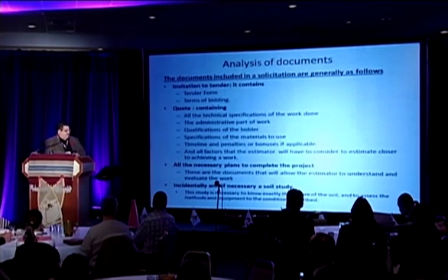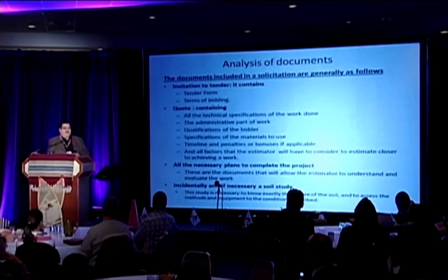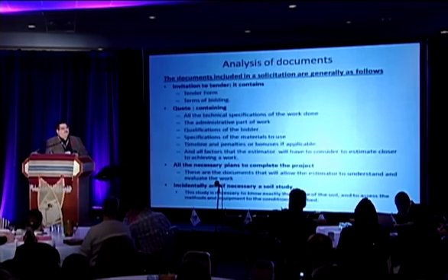Also included in the bid documents, and this is always a concern in the north, it will be the necessity of having a soil study, which is usually provided by some engineering firms that went to do some soil tests for the client. A very important part for any bidder to look at, because if you're bidding and you neglect the soil conditions, your estimate might be way off, and could cause you some major